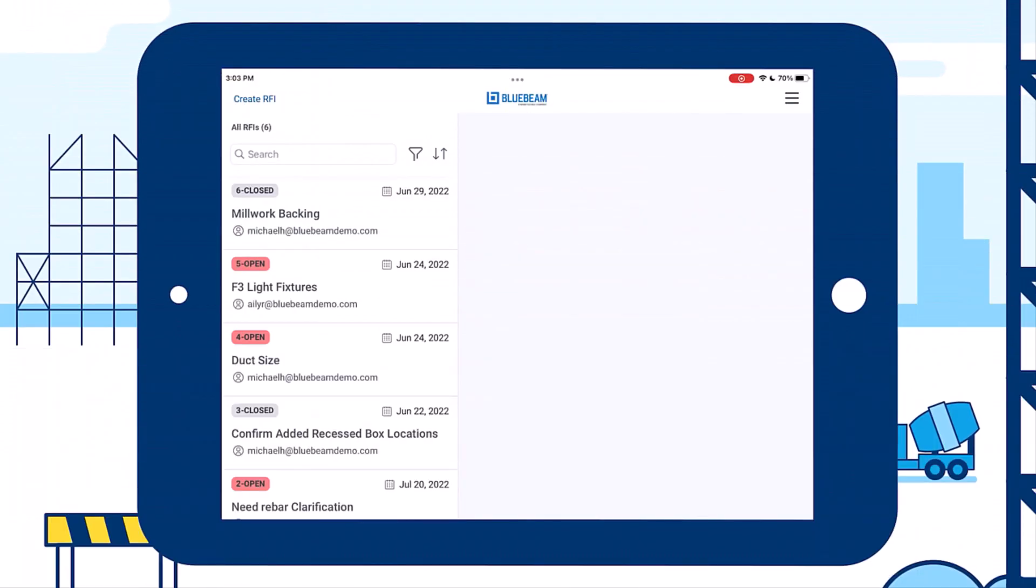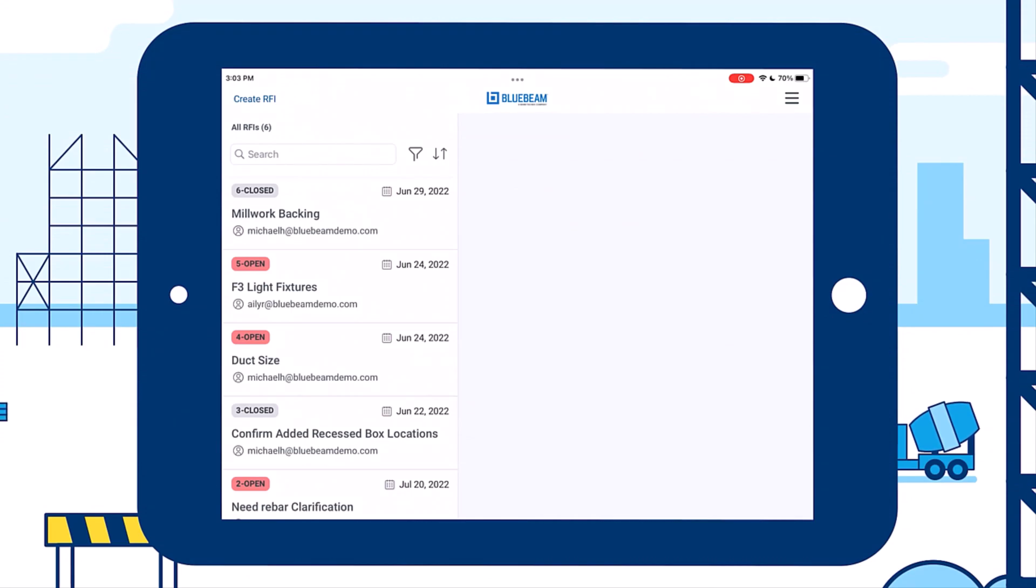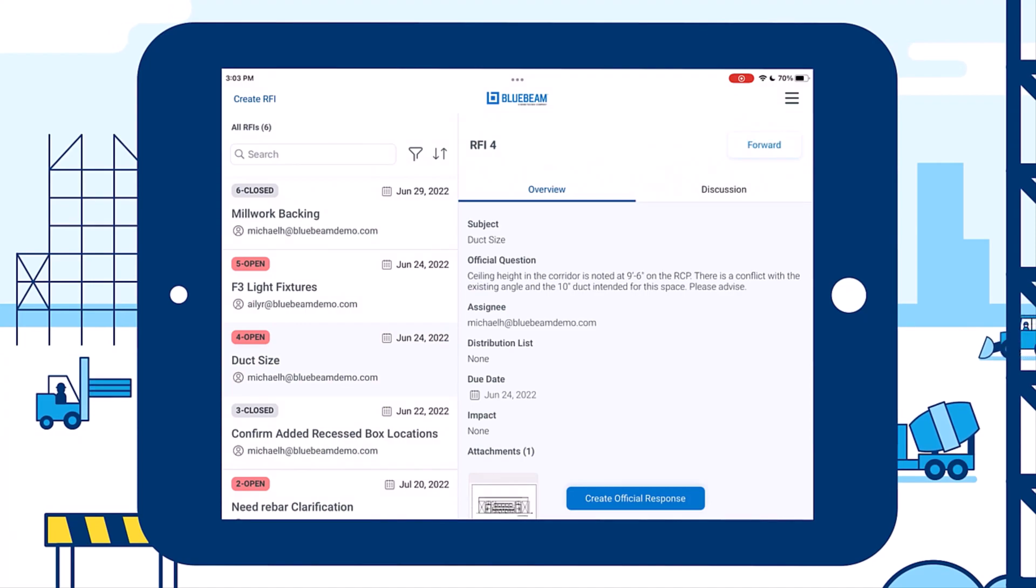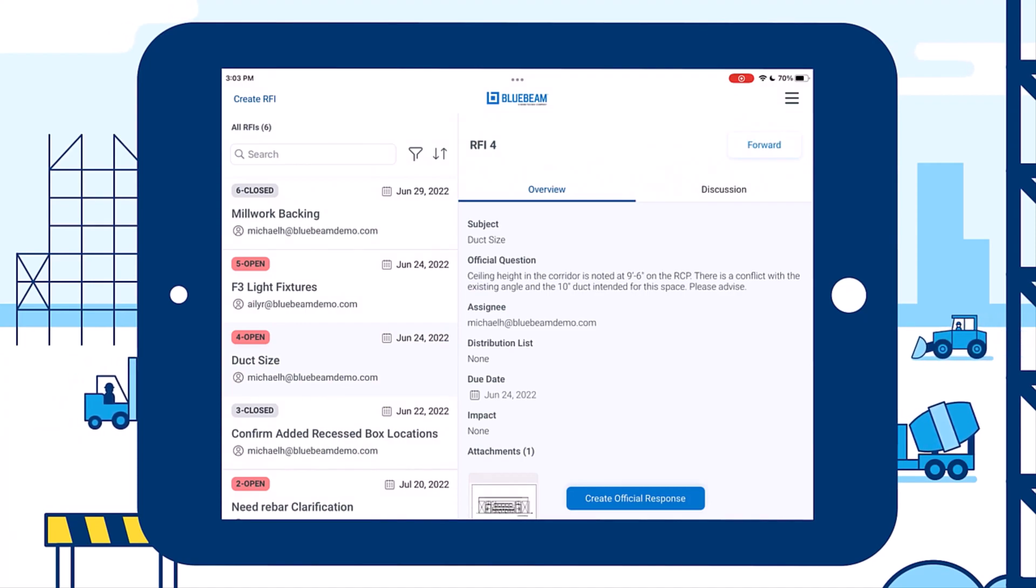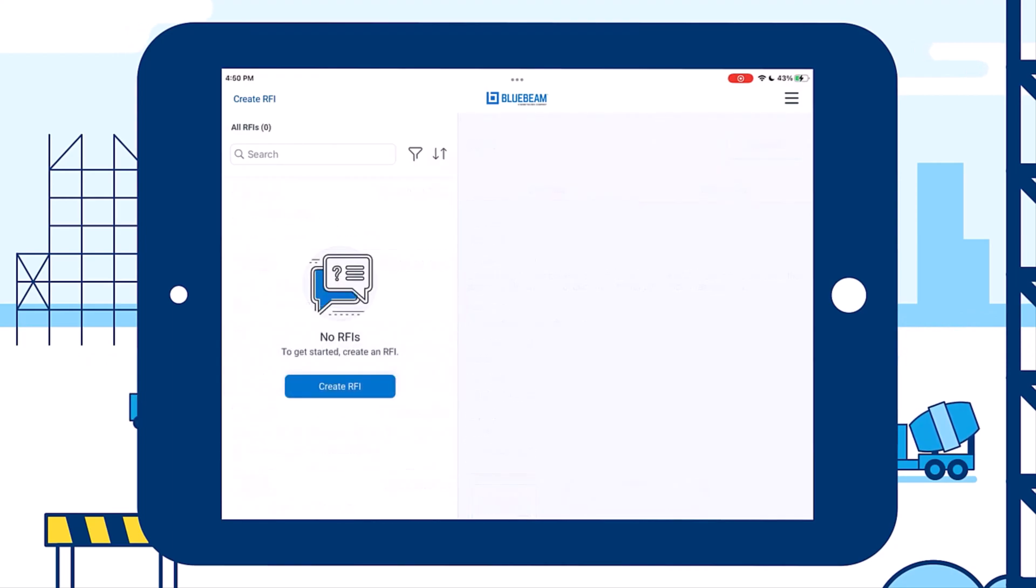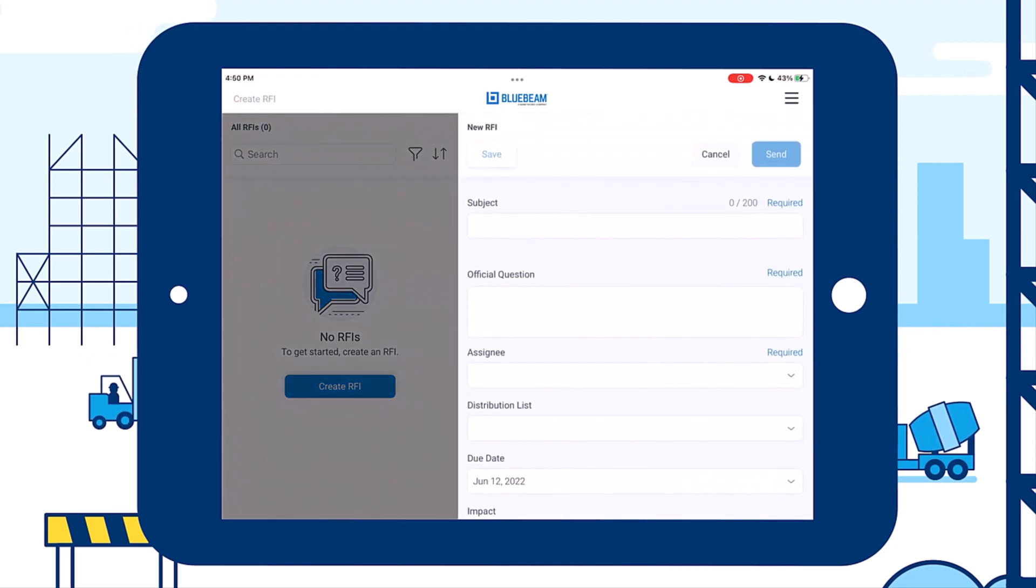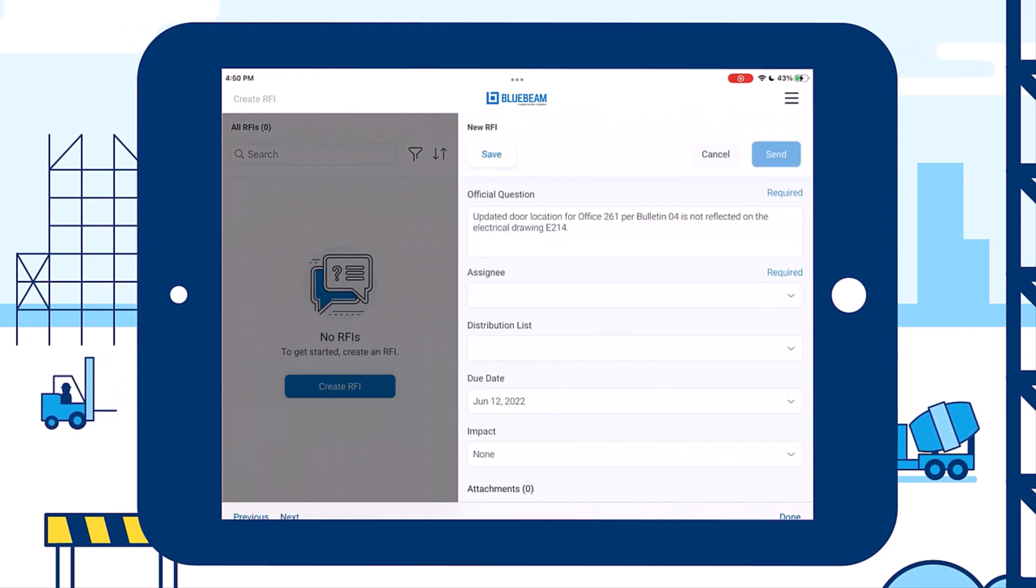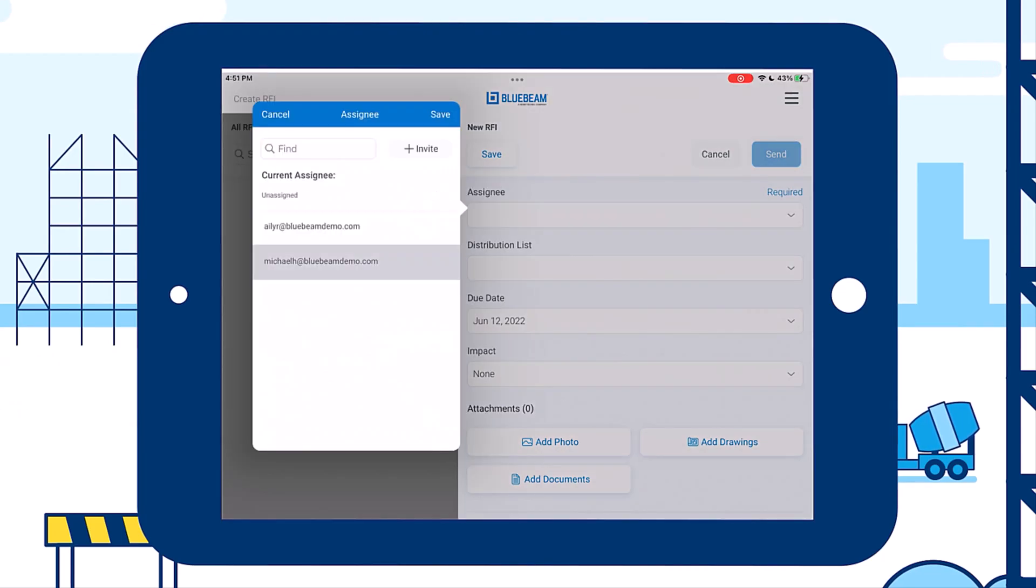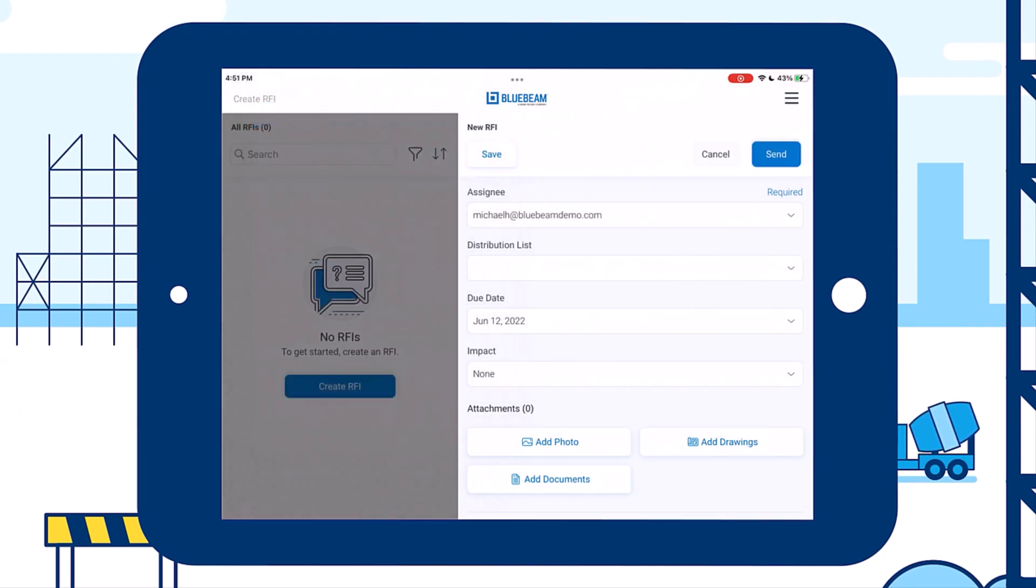You can also effectively organize RFIs with notifications that keep your team in sync, and robust controls that ensure RFIs are the source of truth for questions on your project. For example, your field team can create an RFI through the mobile app and send it to your team in the trailer to complete it.